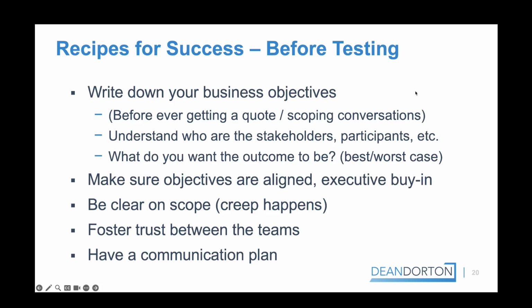Scope is important. You need to understand what you're going to be testing. Scope creep does happen. When it's a minor issue of, oh, we just need to add a couple of subnets that we forgot, that's fine. But if scope goes from doing an internal test to, oh, we forgot we also need Office 365, that's going to require different methodologies. It's going to be a bigger problem. So understanding before you go about purchasing an assessment is important.